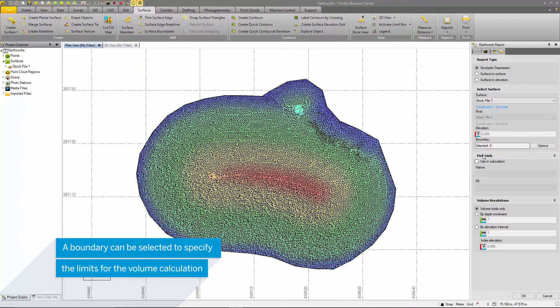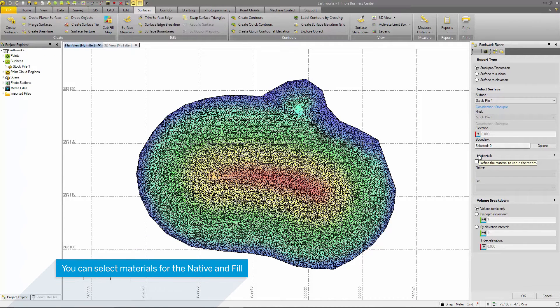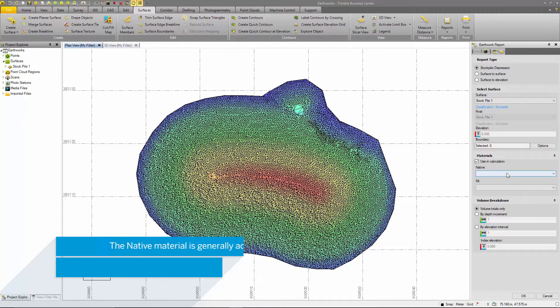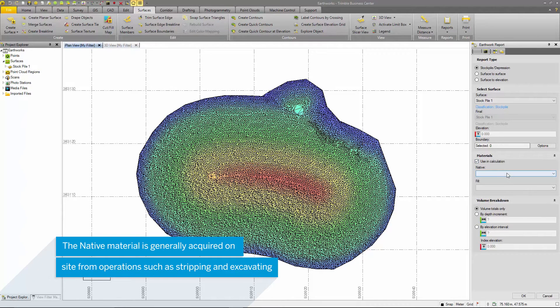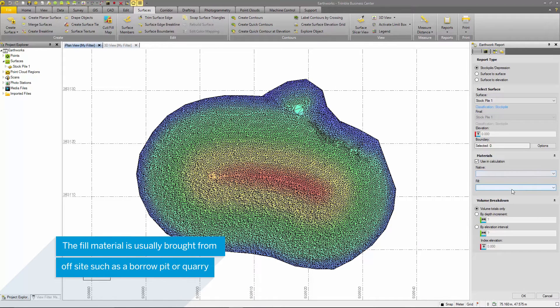The next option is to select the material type for the native and borrow materials. These can be selected and created in the materials site manager. The native material is classified as the material being excavated from the site, possibly for future use, and the borrow material is considered brought from off-site.